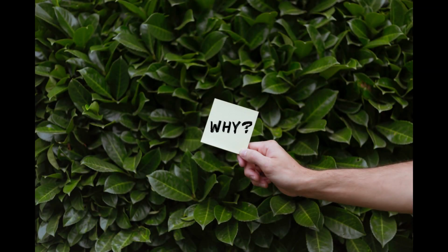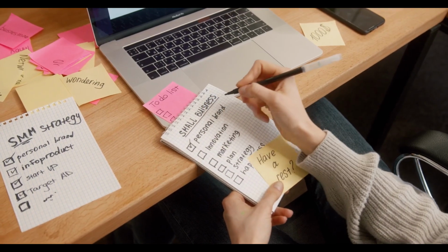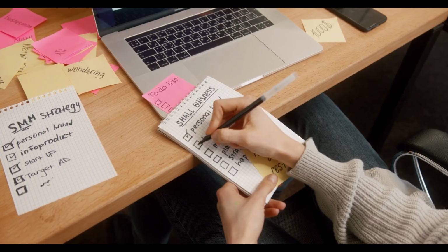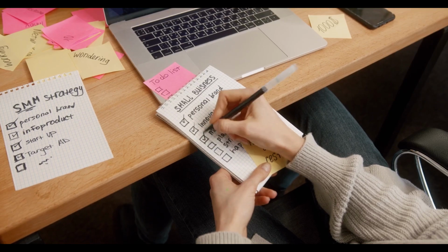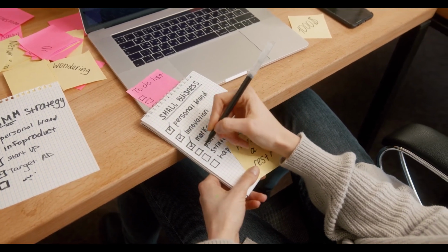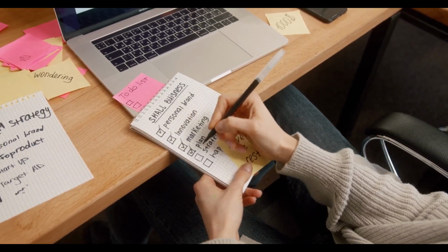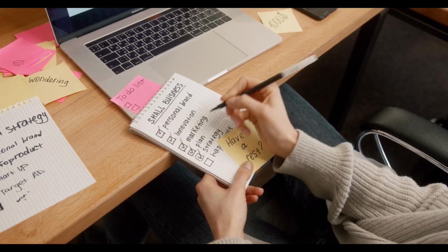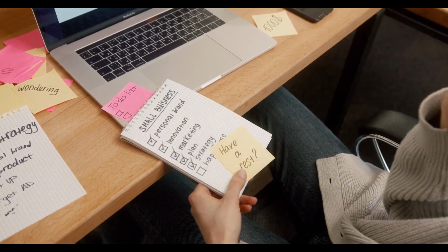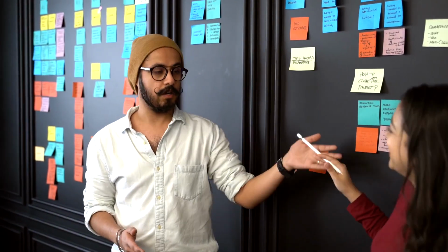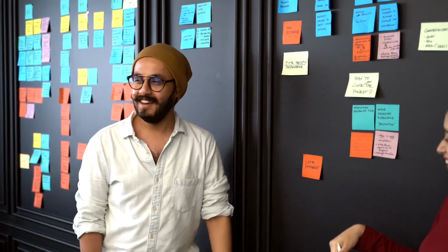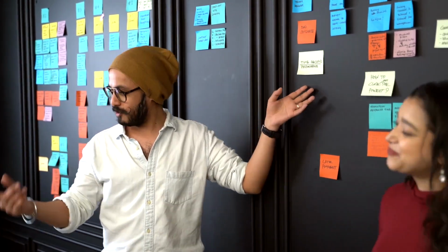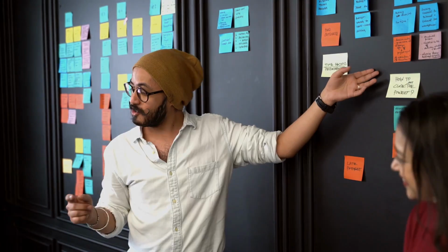So why do we use an action tracker? We mainly use action trackers to keep an eye on the activities that people promise to do for us, or to track things that we've promised to do for others. We may use different formats which have more or less information for internal customers versus external customers. For example, we may use an internal action tracker that might detail tasks to be completed by individuals, whereas an external action tracker might detail deliverables by business unit or business partner.